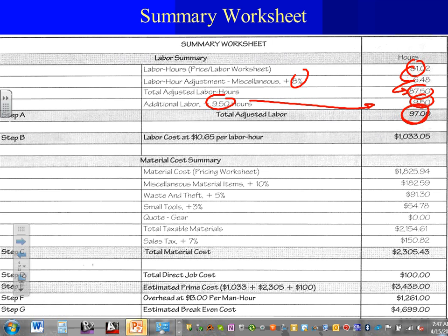your estimate summary. And then you allocate a dollar value for your hours, and then you multiply these two by each other, and that will get you this value, right? Get you $1,000 for the project. Then this is your labor.